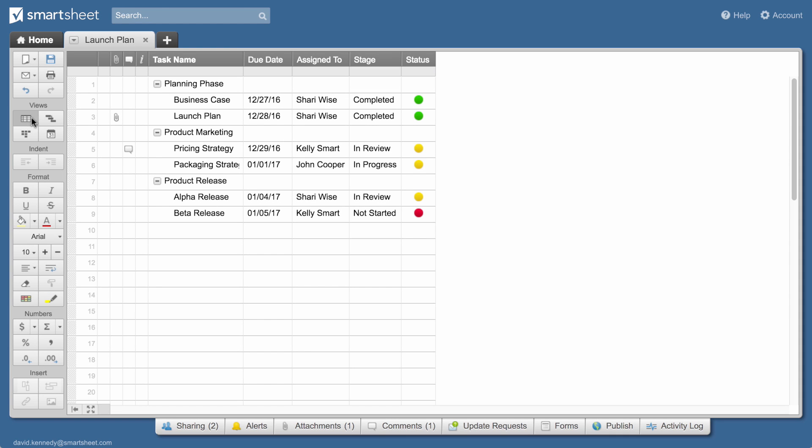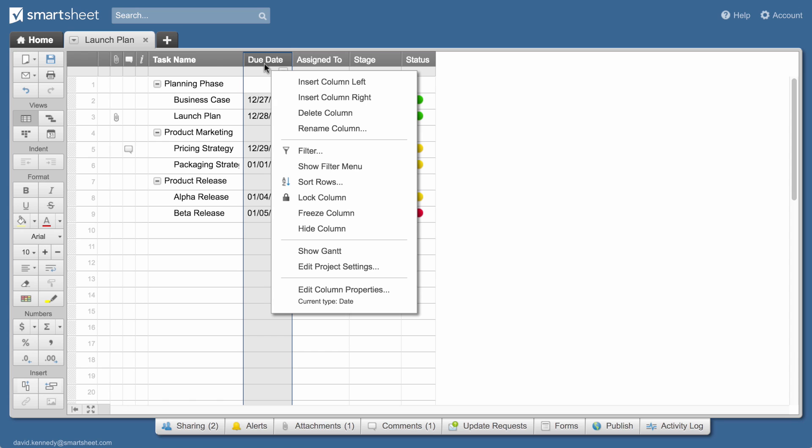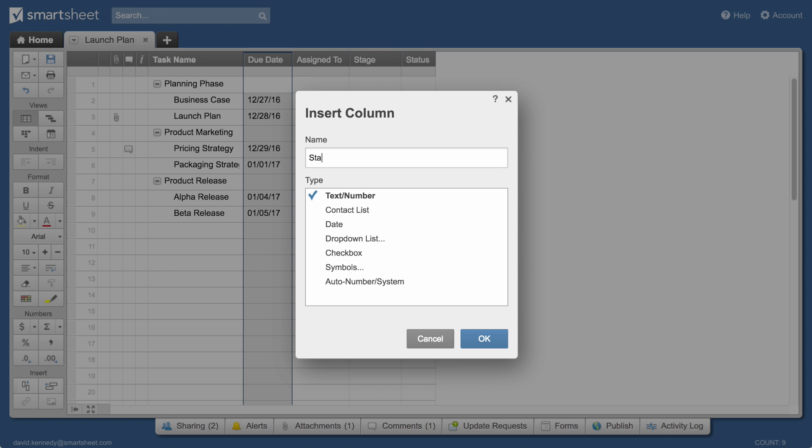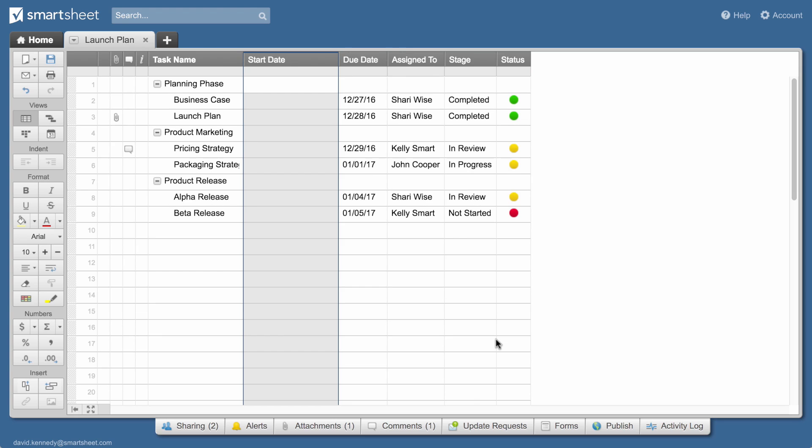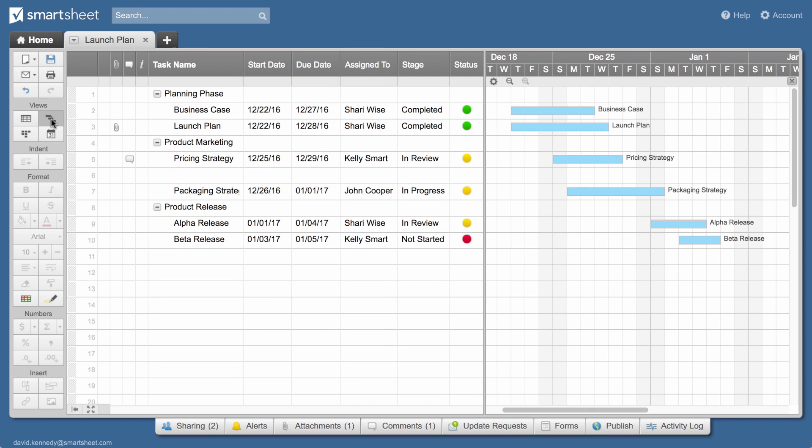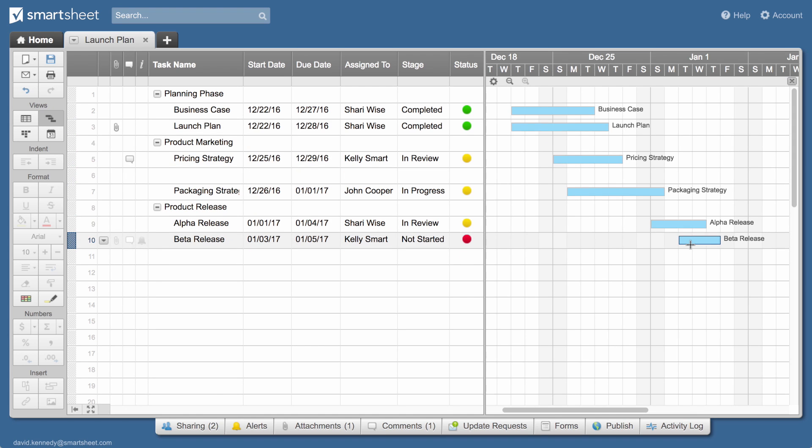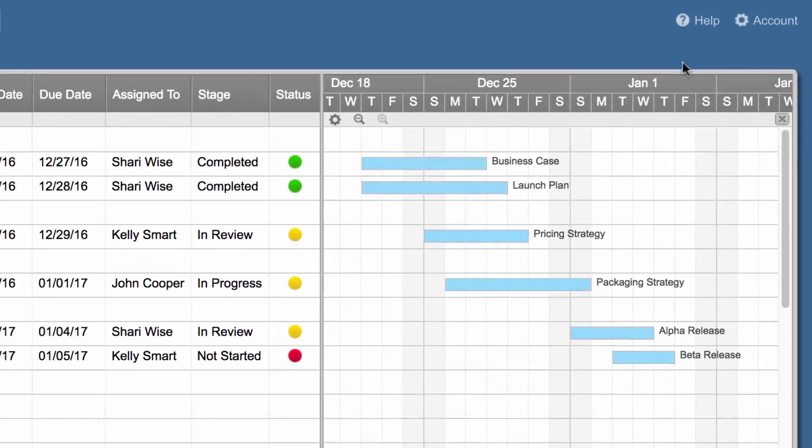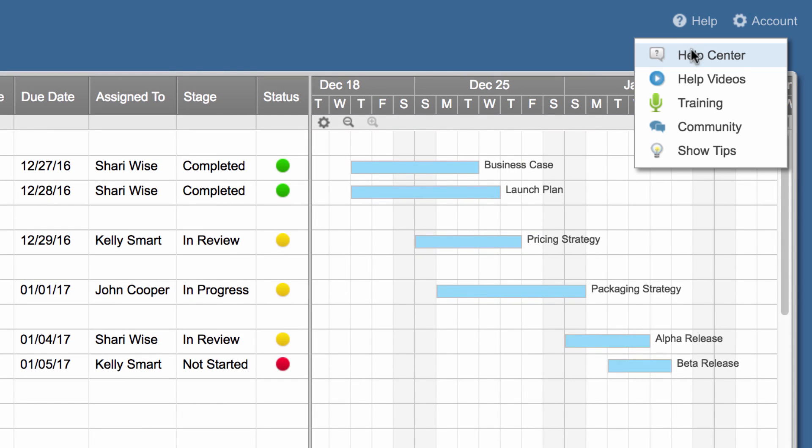You can also view your sheet as a Gantt timeline. The sheet we created has due dates and will add start dates so we can use the Gantt view. And that's how you set up a sheet in Smartsheet. To learn more, check out these resources.